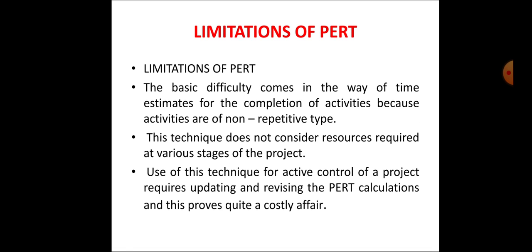Then what are the limitations of PERT? The basic difficulty comes in making time estimates for the completion of the activities, because the activities are of a non-repetitive type. This technique does not consider the resources required at various stages of the project.